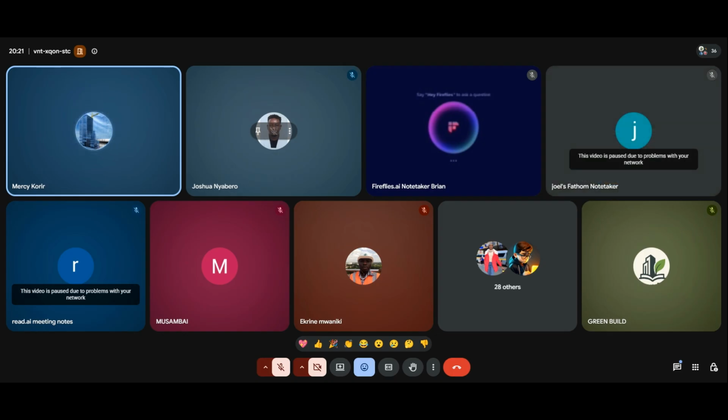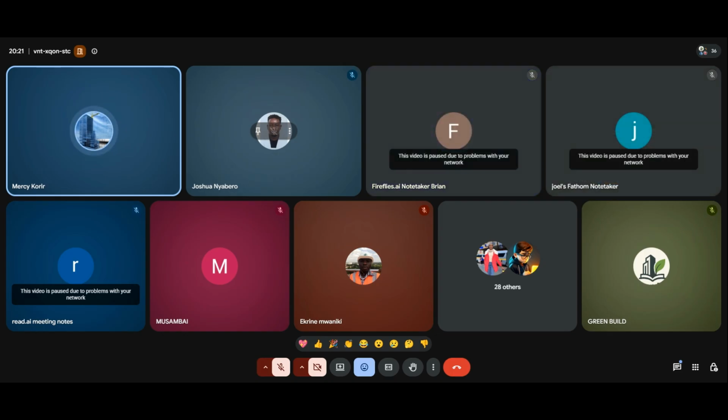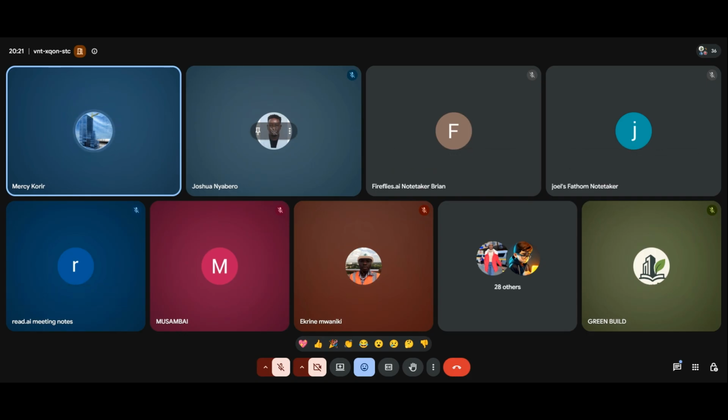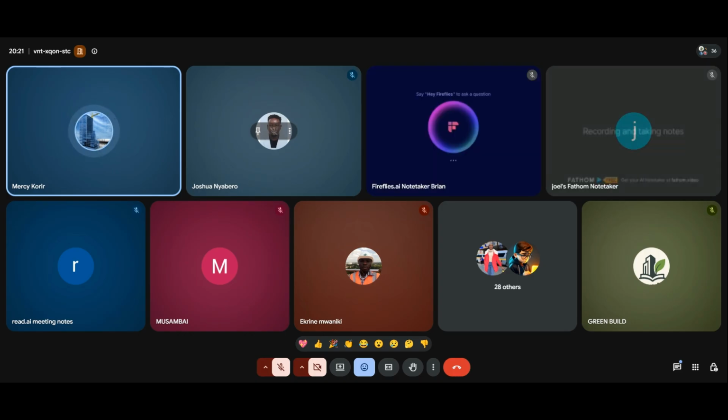Once you fulfill your weekly program, it means you can fulfill the master program. If you fail to fulfill your weekly program, you also fail to fulfill your master program. And we all know that if you don't complete your project in time, there's a cost for liquidated damages. So it's crucial to keep your project in check so that you deliver it in good time.